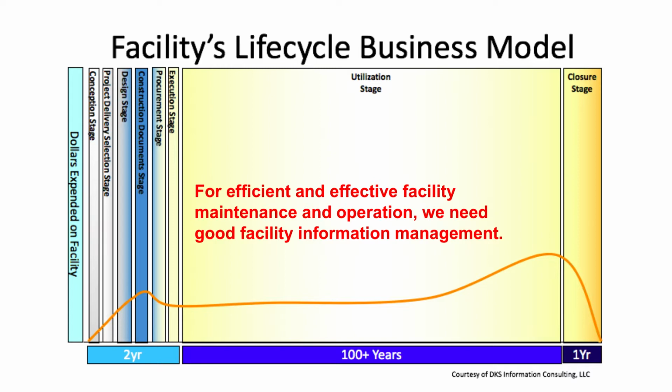Traditionally, after a facility is constructed, information about the facility in a set of 2D CAD drawings and associated documents, or in paper format, is handed over to the owner or facility manager. Not mentioning the handover information is only partly relevant to facility management. It is very difficult for the facility manager to be efficient and effective in searching for the information needed for operation and maintenance, and maintaining consistency among information on papers.